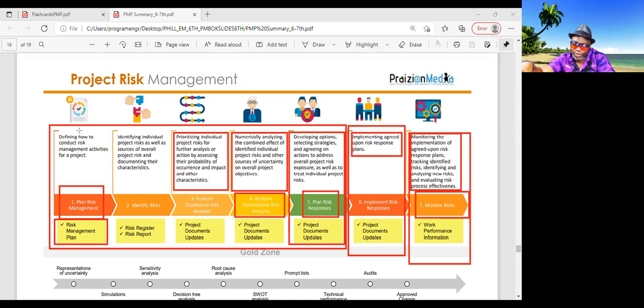So an issue is something that is happening right now. If a risk is already documented in the risk register, then you just keep tracking it, and all of the documentation keeps being updated in the risk register. There's no need for you to move it. You just keep tracking it, because if you've implemented the response, then you want to track if it was effective or not. So there's no need for you to track it in two places. Just track, okay, the risk happened, we couldn't get a handle on it, or we did, and all of that stuff becomes part of your lessons learned.